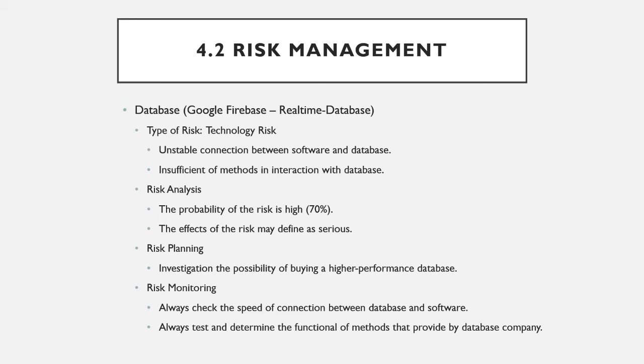Identification the possibility of buying a higher performance database. Risk monitoring. Always check the speed of connection between database and software. Always check, test, and determine the function of method that provided by database company.